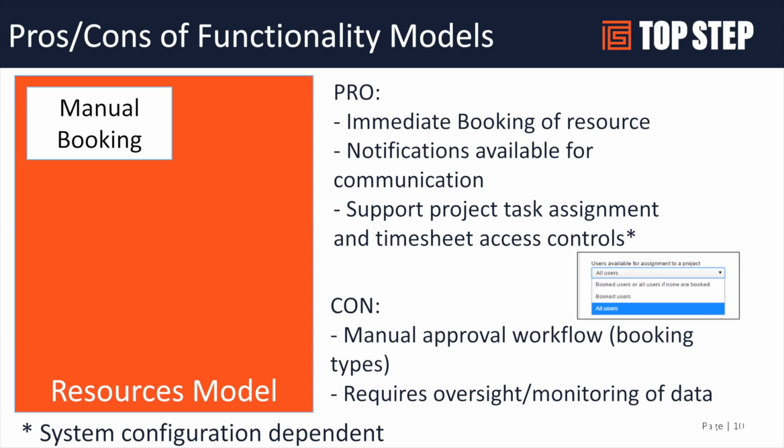The resources are then booked to the project, and then the project manager goes in and now has the ability to assign those booked resources to their tasks. So that's an out-of-the-box feature that really allows you to enforce the behavior in that model where there is a resource manager and project manager working together.